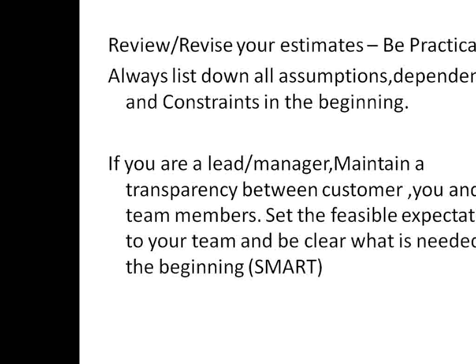And whenever you do any estimation, always list down all the assumptions, dependencies and constraints in the beginning. See, there is no IT project in the world which does not have any assumptions or dependencies or constraints, technical constraints or any other constraints. Dependencies, it may be dependent on some technology, okay, for which the support is not available, say in India. I am developing a software using some technology or tool for which the support is not available outside of India. So that is my dependency. If the support is not there, I cannot work further.